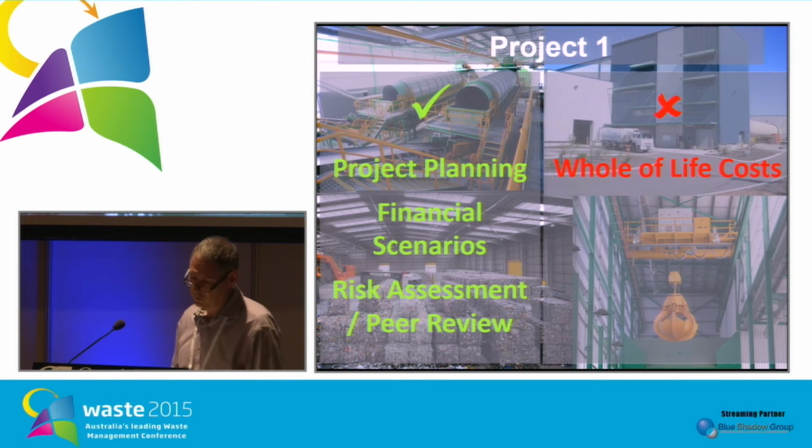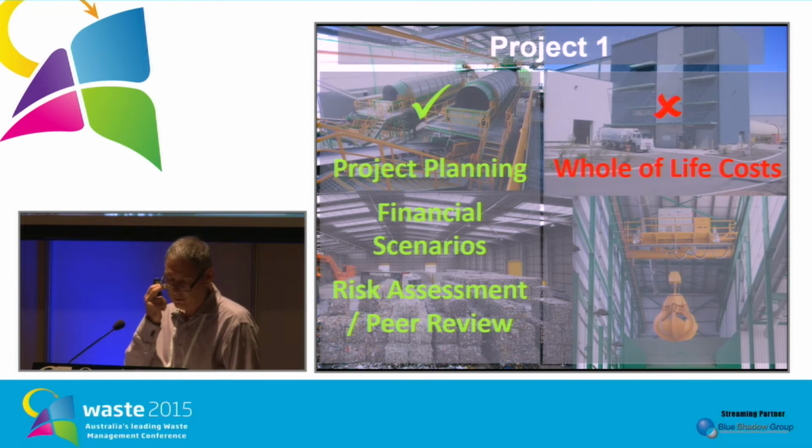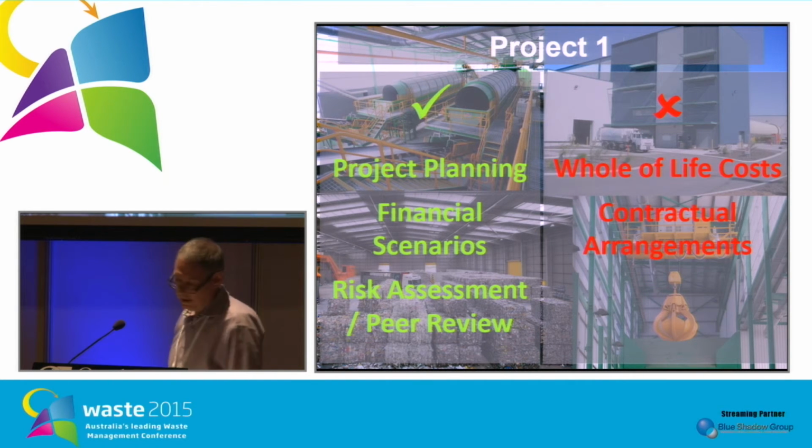So for this one, there was a few little negatives, nothing major. The initial business case, they failed to look at the whole lot of costs. So while they had the initial costs really well identified, ongoing costs weren't so clearly identified. So the ongoing obligations for each of the councils wasn't as clear as it could have been. And while they'd based a lot of their assumptions around the fact that they'd have contractual commitments, they were all sort of handshake type arrangements.